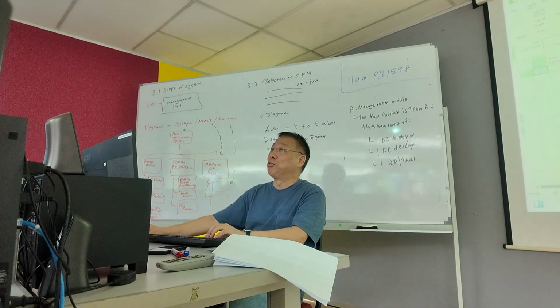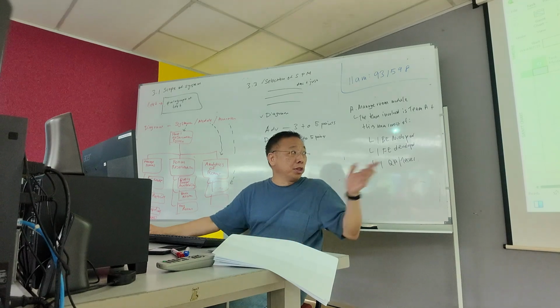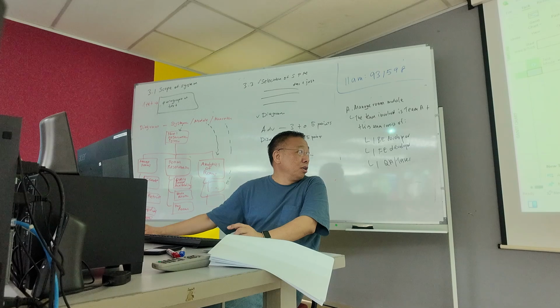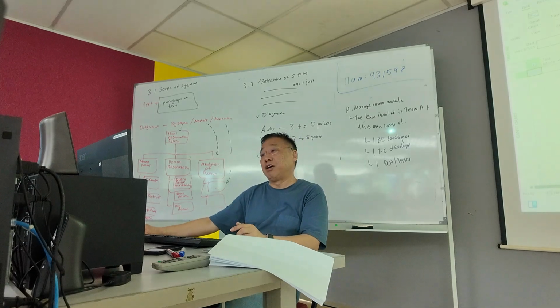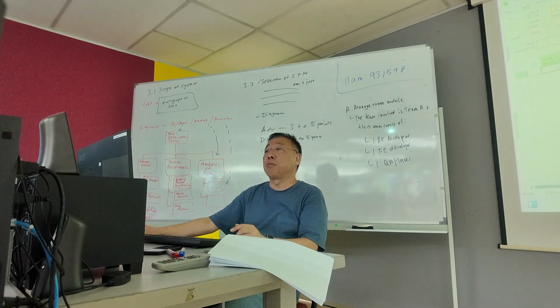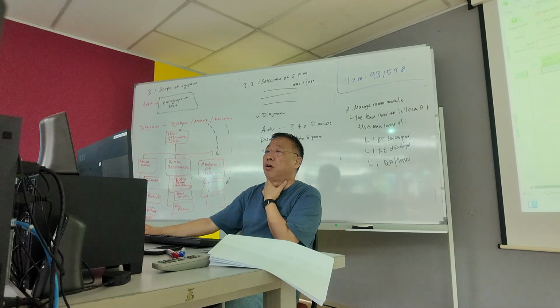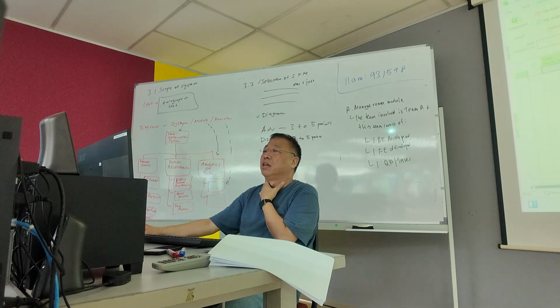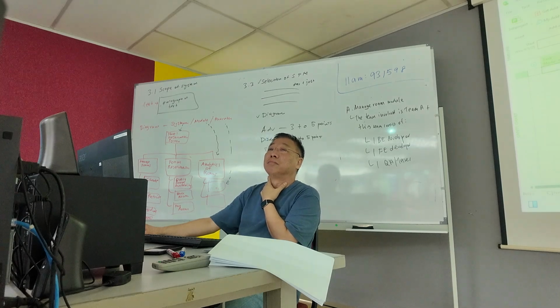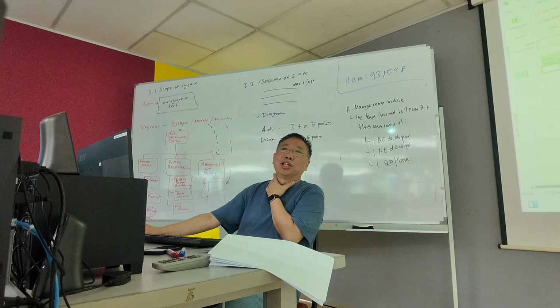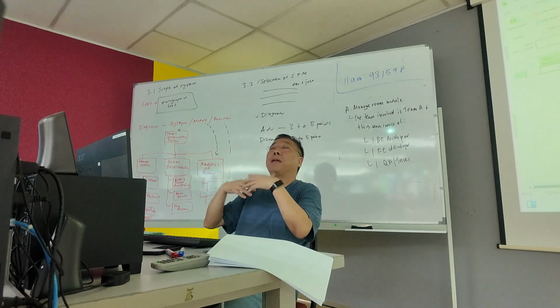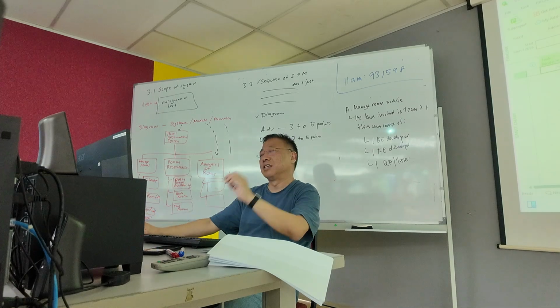So I'll start off with a blank project again. First thing I want to do, if you forgot, is go to the bottom here and change new task to be auto scheduled, so I don't have to key in lots of stuff. Remember, it will put in the dates and days for me. Also, when you first start the project, you should go to Project and enter the start date. In my case, it's July now, I don't want to start so soon. Maybe I want to start on the 1st of September, which is nicely a Monday. For our assignment, it doesn't matter when you start because you are only planning right now, so you can start at a later date.